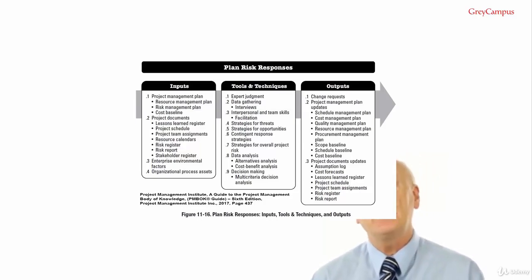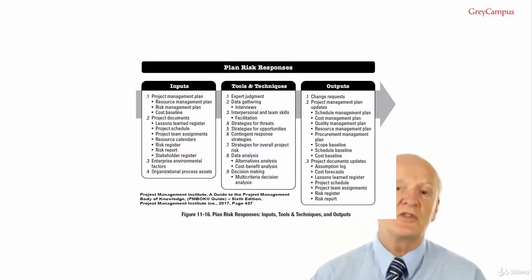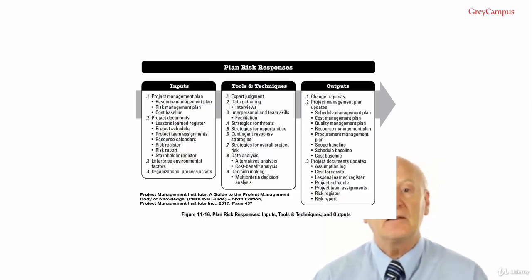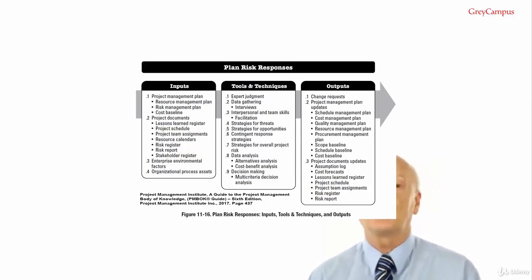Transfer can be achieved by a range of actions which include the use of insurance, as I mentioned, performance bonds, warranties, guarantees, etc., or of course by outsourcing the work.